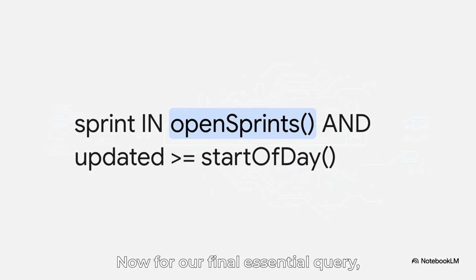Now for our final essential query, we're going to use the in operator right alongside open sprints. This little combo brilliantly finds everything actively being worked on in the current sprint that has also been updated today. It is literally the perfect query to run right before a daily stand-up so you can see exactly what's moved in the last few hours.